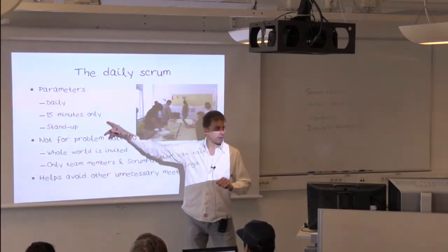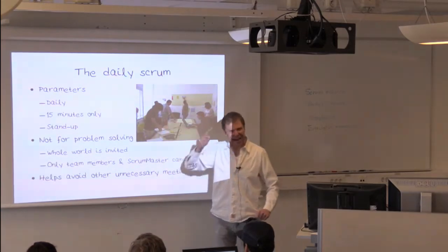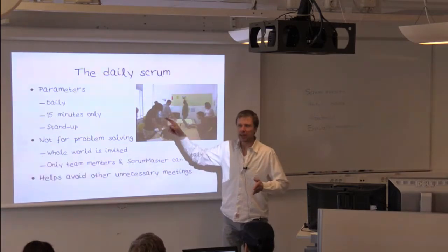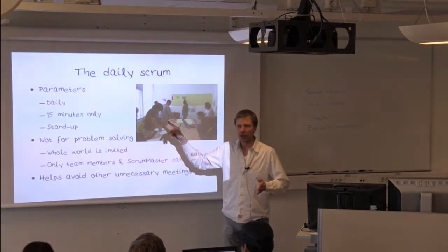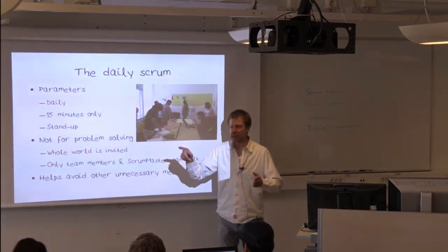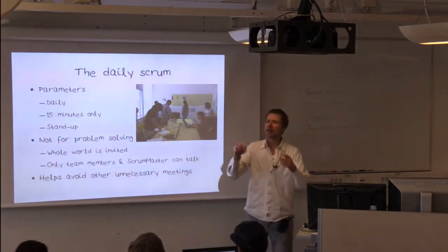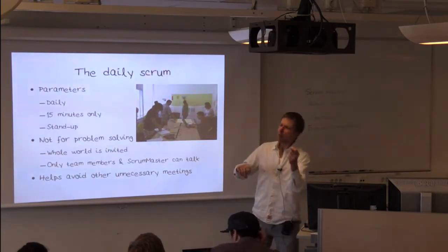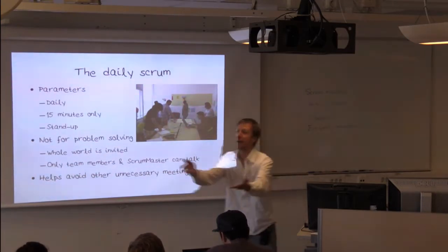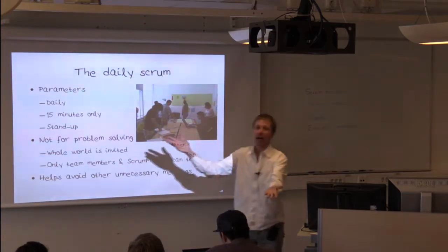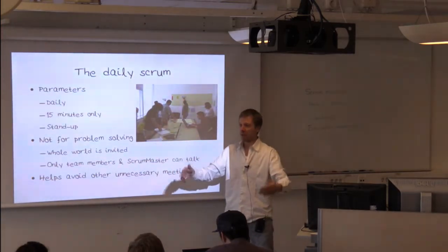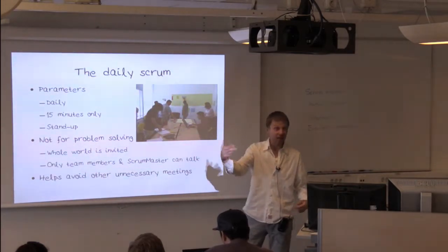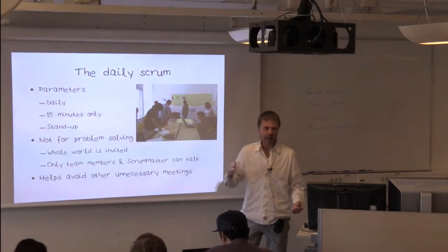It's supposed to be 15 minutes, and you really need to be strict about time-boxing it, because there are so many things you want to talk about, and it's so easy for somebody to say, I need somebody to help me with this, and somebody says, well, exactly what is it that you need, and then you're in a design discussion, and an hour later, the rest of the team is just sitting there bored because they don't really care that much about the details of this particular implementation. Don't waste people's time.